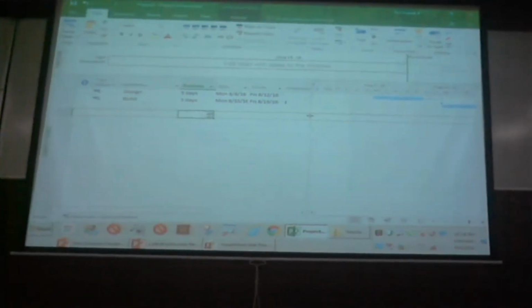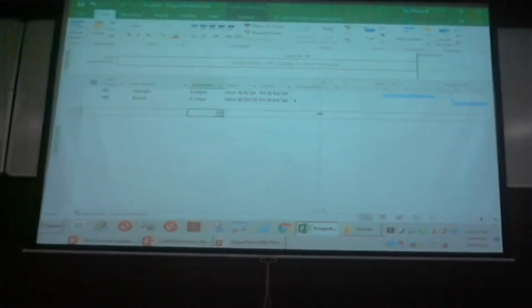Go ahead and then change it to design, build. So what do you notice now? The dates are automatically put, which some of you may not like. And I'm going to set the dependencies as 1 to 2. Now, if my design is going to take longer, just observe the dates are automatically getting adjusted. So can we have an applause, please? It's not for me, but for Project.